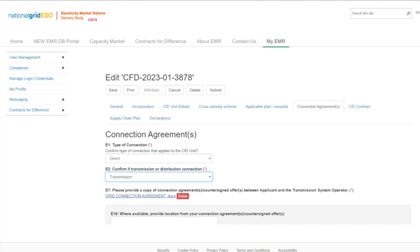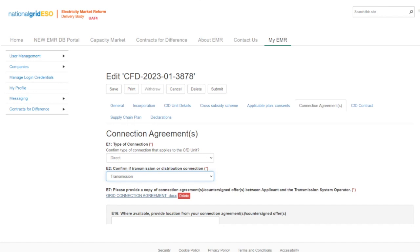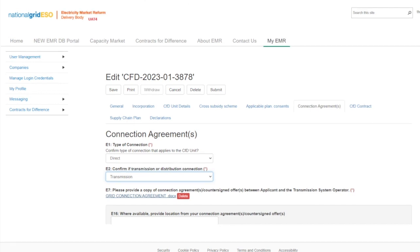There are a number of validation checks that the delivery body will perform on the uploaded documentation. In this direct transmission example, some of these are: firstly, the transmission entry capacity specified in the connection agreement is at least 75% of the initial installed capacity estimate of the CFD unit; next, the target commissioning date appears to be on or after the connection date specified in the connection agreement; and there is nothing in the connection agreement indicating that the technology of the CFD unit is not the same as specified in the application form. It is good practice for applicants to check their documents against the Schedule 5 checks in the allocation framework.